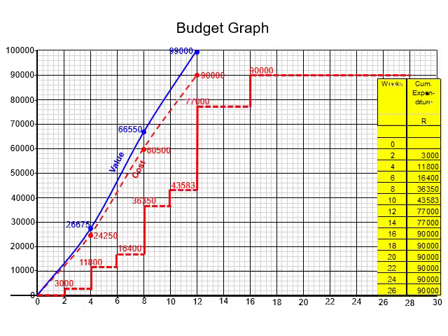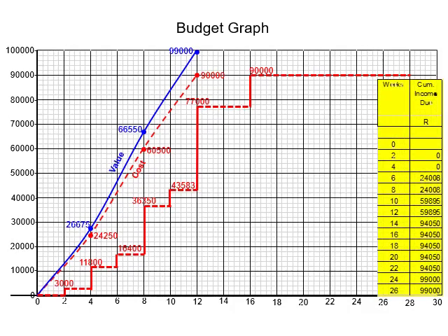The last graph line to be drawn is the cumulative income due. Here, the same procedure will be followed as for cumulative expenditure. However, we shall only use amounts from the cumulative income due column, record them on a monthly basis, and draw with a green pen. Note that the first amount of revenue, reflected in the worksheet, only occurs at week 6.